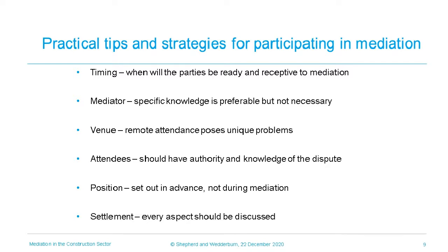The next consideration is the choice of venue. Neutral venues will cost more, but it may be preferable to hosting the mediation at either party's office. In addition, practical considerations include the availability of Wi-Fi, printing facilities, and the physical location of the rooms. In this current climate, remote mediation negates some practical considerations, but throws up its own challenges. It is important to ensure that each attendee has the necessary IT facilities to attend the mediation and also the necessary technical know-how to use the chosen video conferencing platform without any issues.